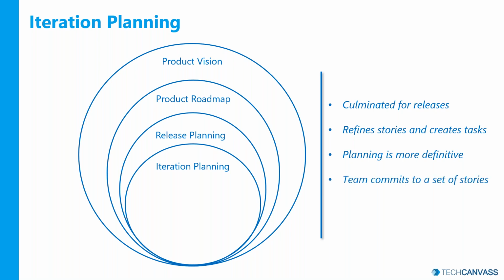And here the team commits what they can deliver in the next 1 week or 2 weeks, depending on the size of your sprint, right? And from there on, the team's focus would be to meet that commitment or deliverable, right? For standard terminology, this is the baseline. If you have to compare it with waterfall, the sprint backlog is the baseline for what the team is going to commit or deliver. Now, is that enough? This is good enough for planning.